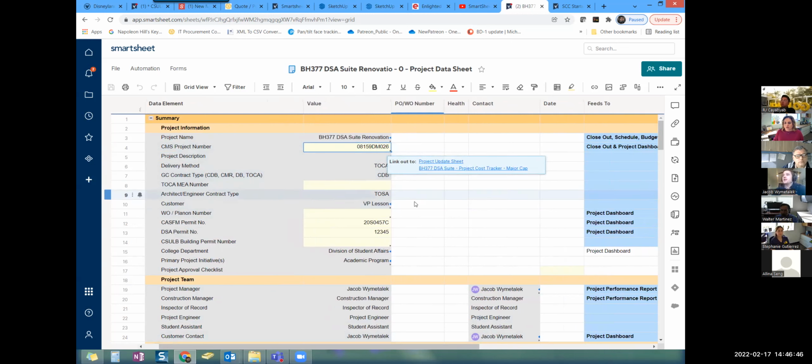Now, this isn't a net new project, it's an existing project. So that's again a slight difference, and that's where we use global updates to reconcile that. But what we're doing right now is we're editing the blueprint, so it impacts net new projects, not existing. So that's one thing to keep in mind. And that's why you don't see that blue triangle here. One reason is because we haven't saved the configuration, but the other reason is because it doesn't affect or impact old projects or existing projects.